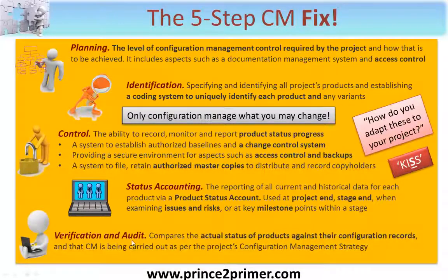And finally, I want to talk about verification and audit. This compares the actual status of the real products against what their configuration records say. You want to make sure that both are harmonized together, and that configuration management is also being carried out as per the configuration management strategy document. So those are the 5 steps. Let's now bring them to life by describing what actually happens within a typical PRINCE2 project.